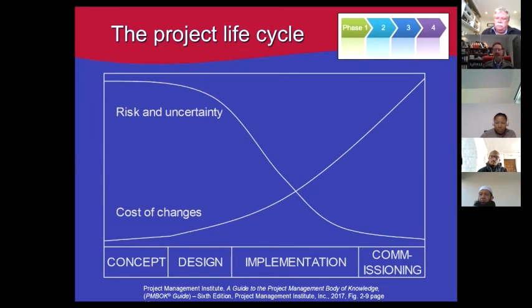That's good. Mike. Yeah, to add on to that, it's exactly what Robert was saying. My opinion was also that as you're implementing, any changes often result in redoing work that's already been done, which obviously adds to the costs. And then when you get to the commissioning stages, you've also had a lot of demobilization from site, so resources might have to be brought back, which means remobilizing and establishing on site, which adds more costs than if it was done towards the beginning of the project when everyone's still on site.